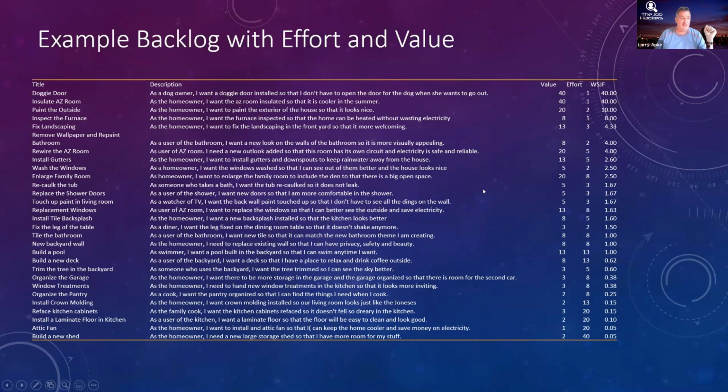But we know how much effort it takes, and we know how much we can move through the system. We call that velocity. Velocity is just things moving over time. So if I know how many stories I can move through the system, we call these things stories, by the way, or items, PBIs. If I know how many product backlog items I can do every week or every 2 weeks, sprint is 2 weeks, I can start to project into the future what I'm going to be able to deliver to my business. Why is predictability so important? Predictability, not predicting the future, but having the ability to show what the future might be is very, very powerful.